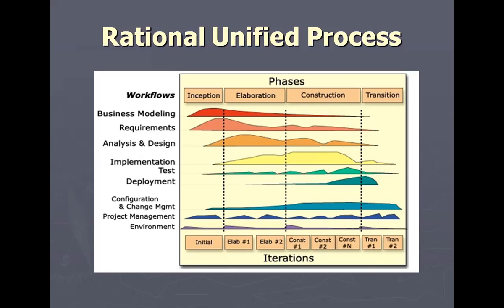Although the term incremental could have been more appropriate, each iteration addresses only a portion of the entire system being developed, unlike the waterfall approach, which attempts to do it all at once. Each iteration has a fine-grained plan with a specific goal. Each iteration builds upon the work done by the previous iteration.